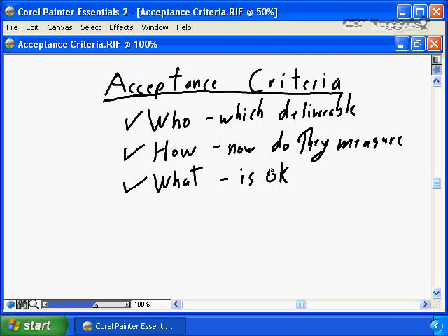But think about something like buying a home. You go in to buy a new home in a new subdivision, you do your final walkthrough, and as part of your final walkthrough, i.e. your final acceptance, you have your measurement criteria, and in that measurement criteria, you walk through your home, and you determine that there's a piece of finish missing in the closet in bedroom number 2.